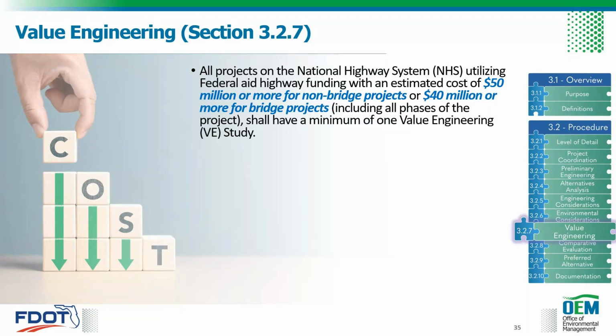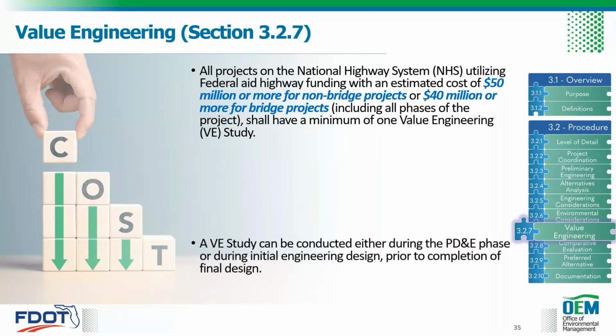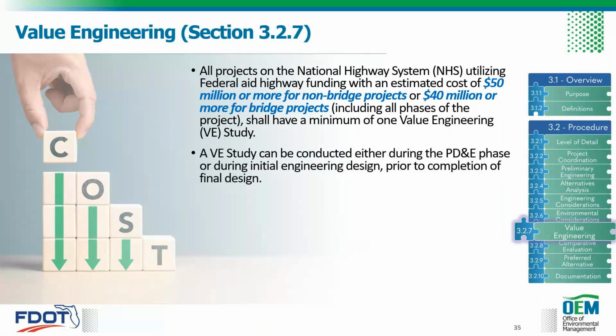The cost thresholds was another update in our 2024 version of the chapter. Previously, the threshold was $25 million, I believe. But as we all know, things are more expensive these days, so the thresholds were raised. So a VE study can be conducted either during your PD&E phase or during the initial engineering design, but it has to happen prior to completion of your final design if you meet this threshold.